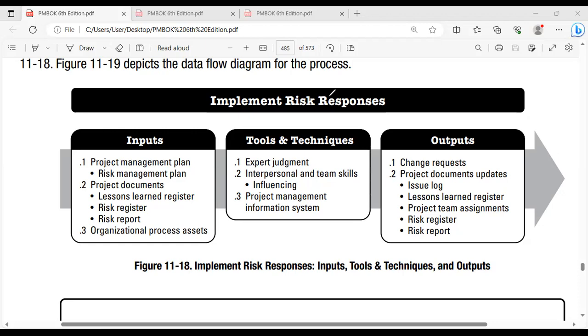What reminds you to evacuate the building once a building is catching fire? Alarm, symptoms, warning signal, trigger. There should be a triggering condition. That trigger condition will be given by the risk owner to the risk action owner. Is it clear or not, guys? You are not only planning your responses, but you need to make sure that the predefined conditions, the triggers, the symptoms, or alarms, you may call them by a different term, are triggered with your triggering condition towards your risk action owner.